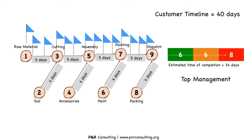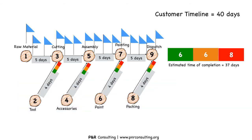So far, we have monitored the performance of tasks in the critical path using buffer. However, what if the tasks in the non-critical path slip? How could we control and monitor these slippages? Here again, we need to use the buffer principle — we need to define similar non-critical path buffers at the point where the non-critical path meets the critical path. It is these buffers that we need to monitor for effective performance.